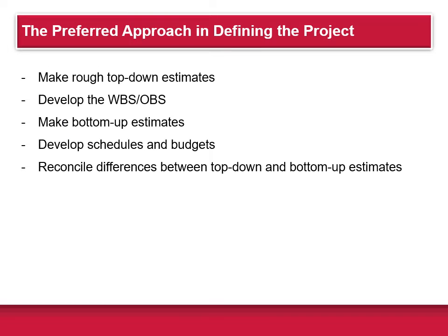So the preferred approach, as I mentioned before, is to make rough top-down estimates, develop the WBS and OBS, and from there use that to make bottom-up estimates, develop the schedules and budgets, and reconcile the differences between the top-down and bottom-up estimates.